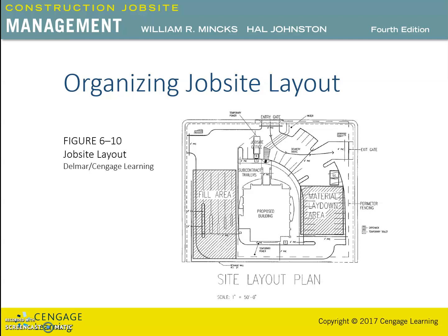Similarly, this information has to be combined with the construction schedule and the capacity charts and technical data concerning the cranes, lifting, and conveyance equipment.